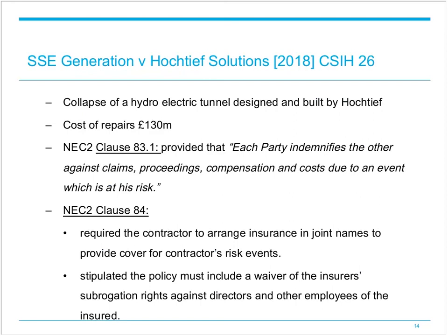Moving to the case study section — there have been several high-profile cases in recent years in which insurance provisions of construction contracts have been placed under the spotlight. One well-known recent Scottish case is SSE Generation Limited against Hocketeeth Solutions, commonly referred to as the Glen Doe case, since it involved the collapse of a tunnel at a hydroelectric plant at Glen Doe in the north of Scotland. The cost of repairs came to over £130 million.